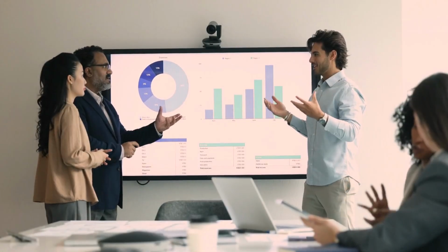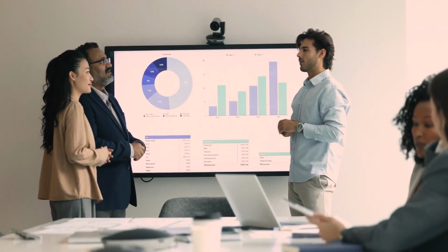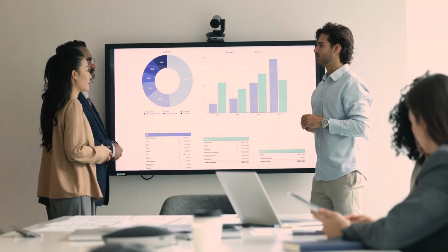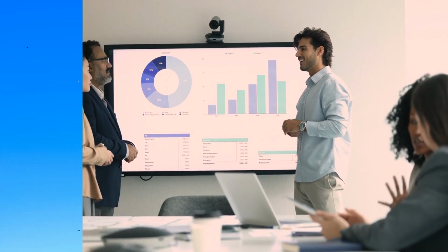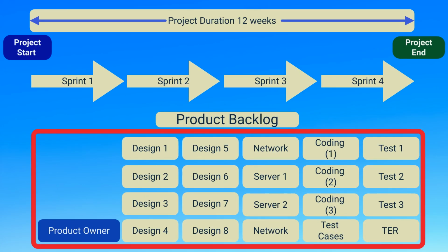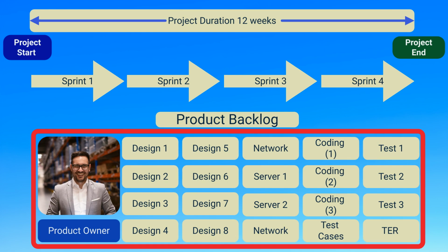This enables prioritization of the work packages that give the most benefit, so they can be delivered in the early sprints. In summary, the Product Owner is the main decision maker in shaping and scoping the sprints, in this case Sprint 1, by deciding which work packages should be delivered first based on stakeholder input, business value, and customer needs.